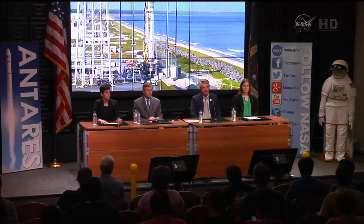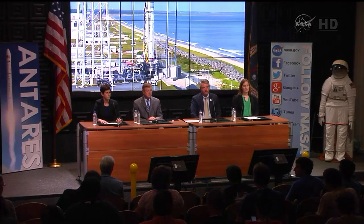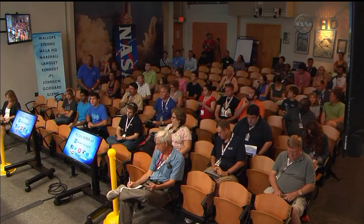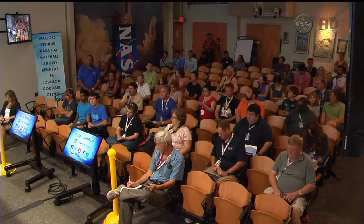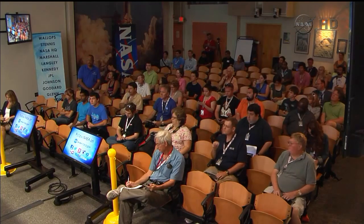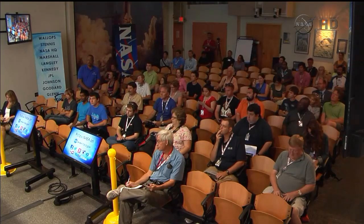Go ahead. J.D. Taylor, USA in Space. Again, for Frank. I know we're coming up with some bad weather after this attempt. Do you have a backup date if it doesn't launch tomorrow? We'll just keep going day by day and check the weather and make sure the systems are working. If we don't launch tomorrow, it depends on the reason we don't launch. If it's a technical problem that takes less than a day to fix, then we'll do that. If it's something longer, we'll adjust.